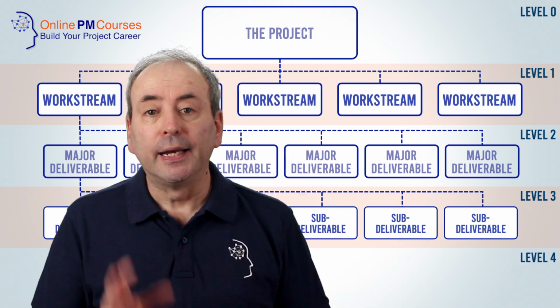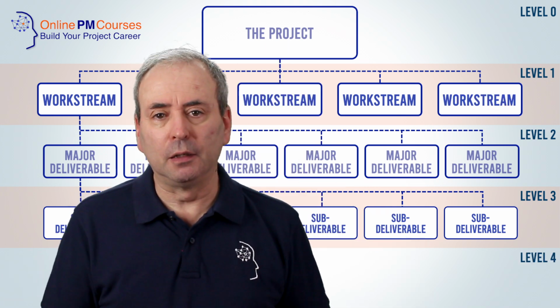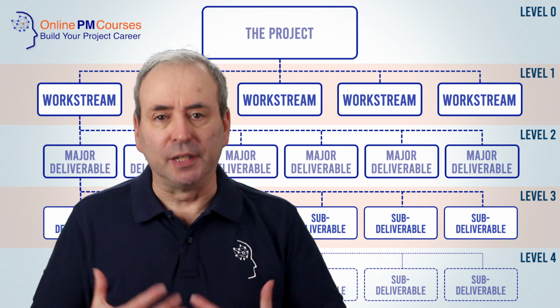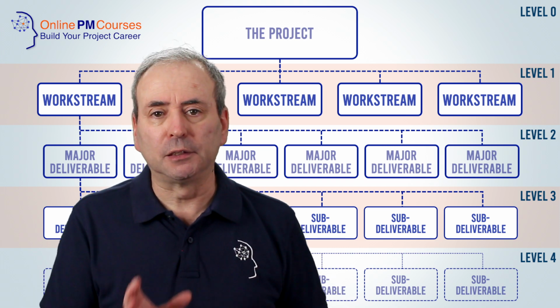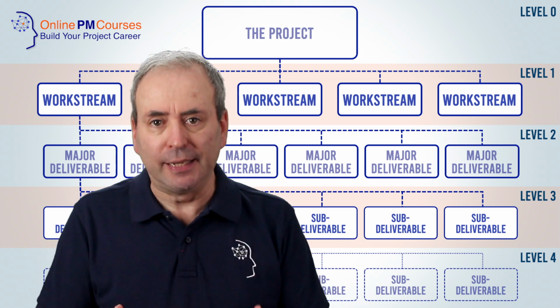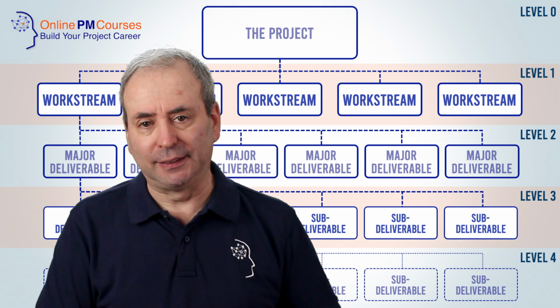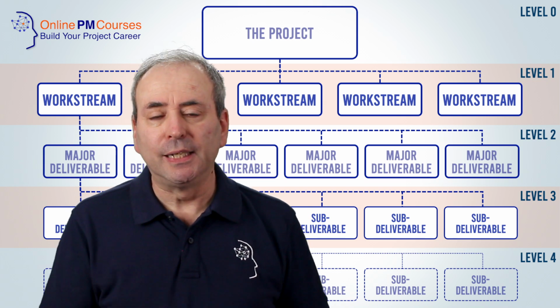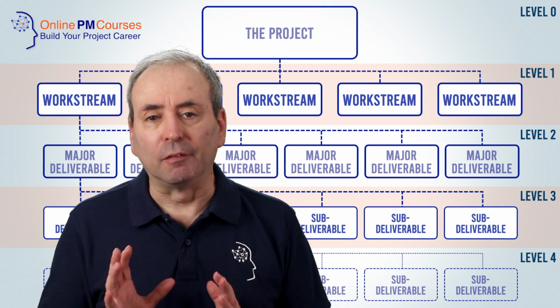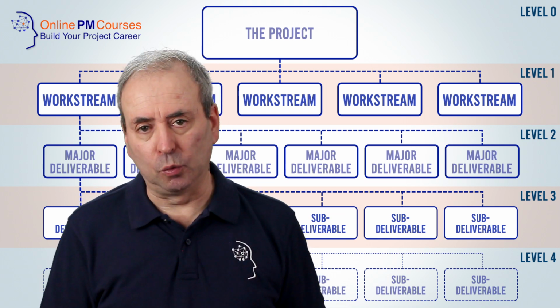Level 4 and maybe levels below this further decompose the sub-deliverables and the interim deliverables into smaller and smaller deliverables to the point where each deliverable is a unique and fully constrained thing in itself. Make sure that these are structured into logical hierarchies and, as far as possible, sequenced in a logical order.